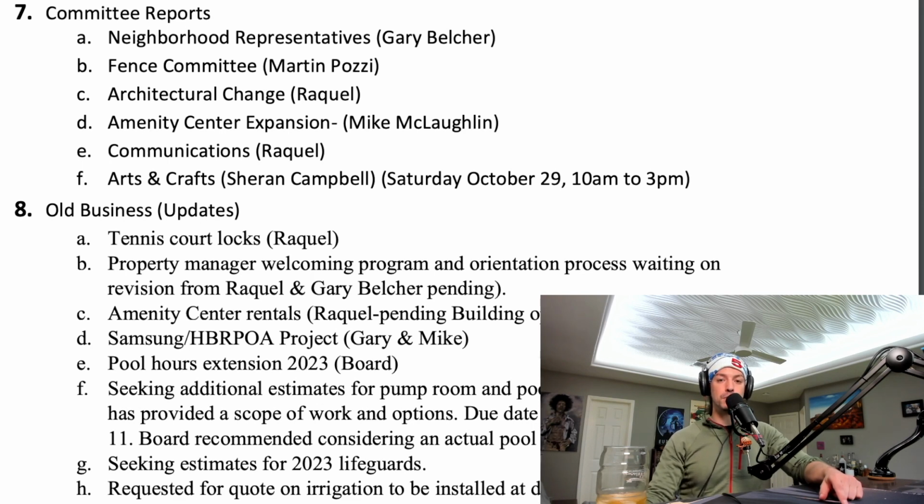That's something that the board is trying to work with Alamo on to see if they'll take a settlement at a lower cost. Mike is still waiting on the VP from Goodwin to provide next steps on how they want to proceed for the punch list items that were not completed, despite the Cooper contractor telling us they were. The board had gone, Mike, Gary, and David had all gone and checked. Those were not completed, and so that's why we never signed off on the final payment to them, as we wanted what we agreed in contract. So that's been terminated, and now we're trying to find what the next steps are. This is the main source now that is holding up our certification of occupancy.